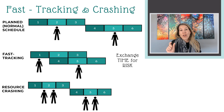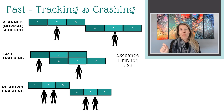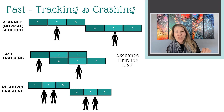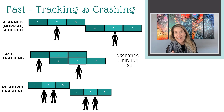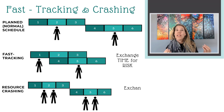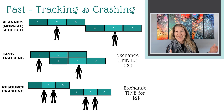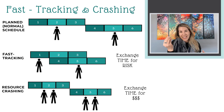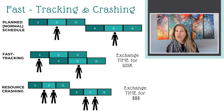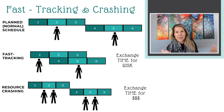So we are still completing the work in sequence — task 1, 2, and 3, followed by task 4, 5, and 6. However, because we are adding additional resources, we're going to get the work done faster. With resource crashing, remember, we're exchanging time — we're going to get it done faster at the cost of money, because we're going to pay additional resources to be working on those tasks to get them done faster.